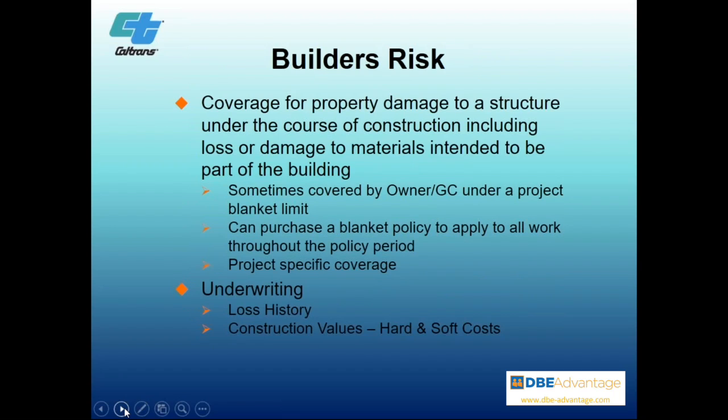Builder's risk. Let's talk simply about that for a second. The coverage for property damage. If you're having a project built and you're the builder, you want to make sure that certain things that you don't intend to happen but happen are covered through this insurance. It happens during the course of construction. The crane can just simply swing and hit a permanent building that wasn't intended to be hit, and that can be covered through these types of insurance.